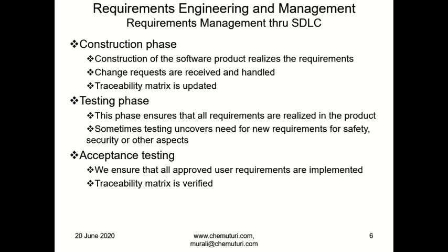At that point, the construction resources or people may find errors in design or find opportunities for improvement in the design, or they may find certain requirements not possible to be implemented, and some requirements may have to be modified. So all these result in change requests, and sometimes the customers and the design people, marketing people, the stakeholders can raise certain change requests. So the change requests have to be handled in the construction phase.